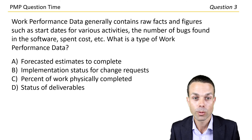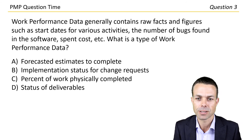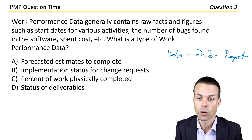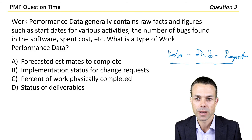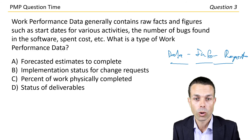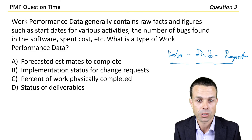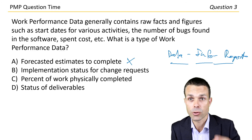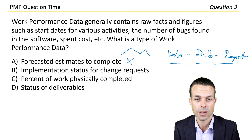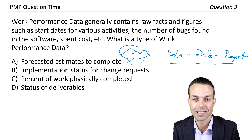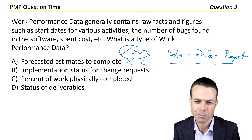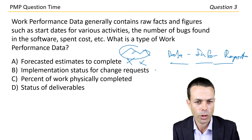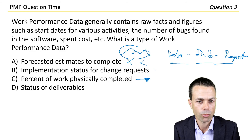Let's look at question three. Work performance data generally contains raw facts and figures. Data goes into information, which goes into reports. The data itself is things like start dates, raw information, just pure facts — number of bugs, spent costs, actual cost. What is a type of work performance data? Forecasted estimates to complete — not that one, because you need to measure it against something else. Percent of work physically completed is a measure — that raw measure of physical completion. That's very promising.